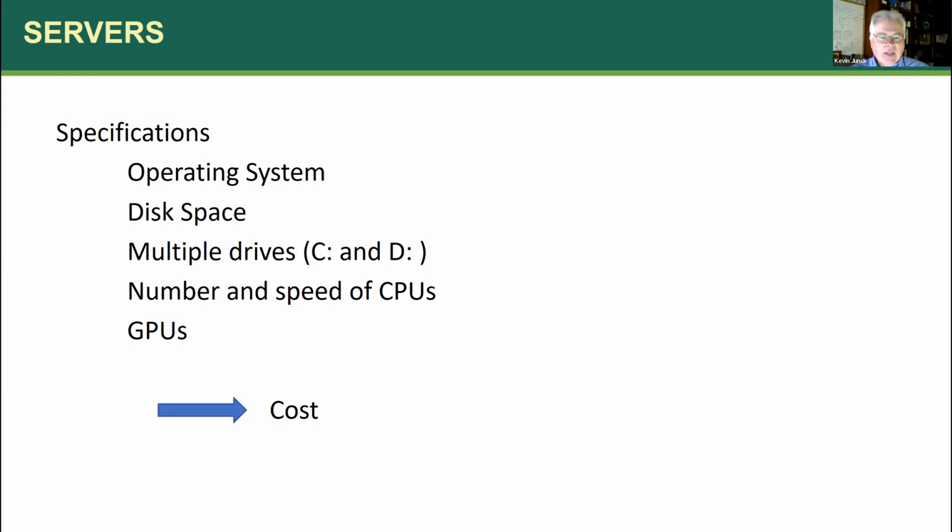Before an AI application system gets dropped into my lap as the technical guy who's going to implement things, there's been a whole pipeline of things going on, like the whole legal and contractual piece, the actual purchasing, reviews with our IT security department. So literally it can be months and months and months before a project gets to the point where I get my hands on it and can actually do something and implement it.